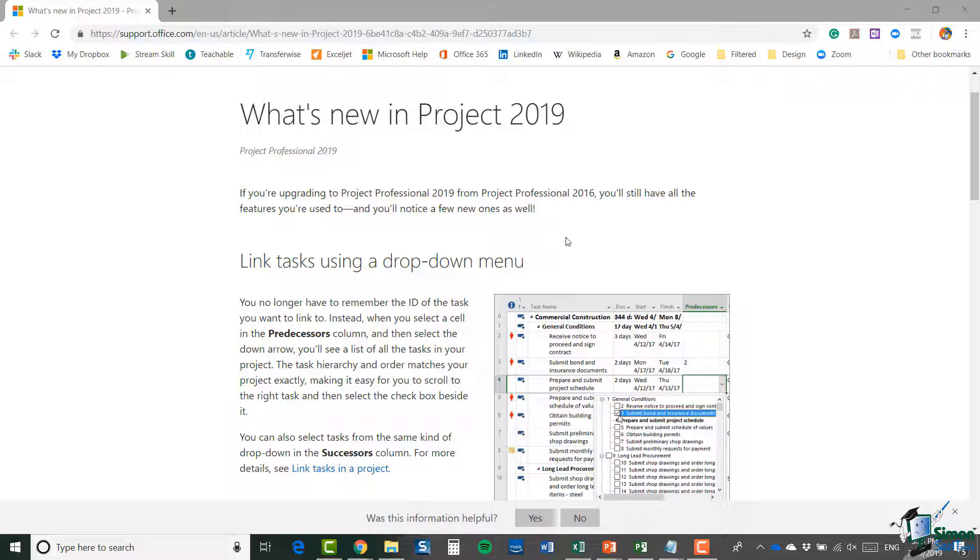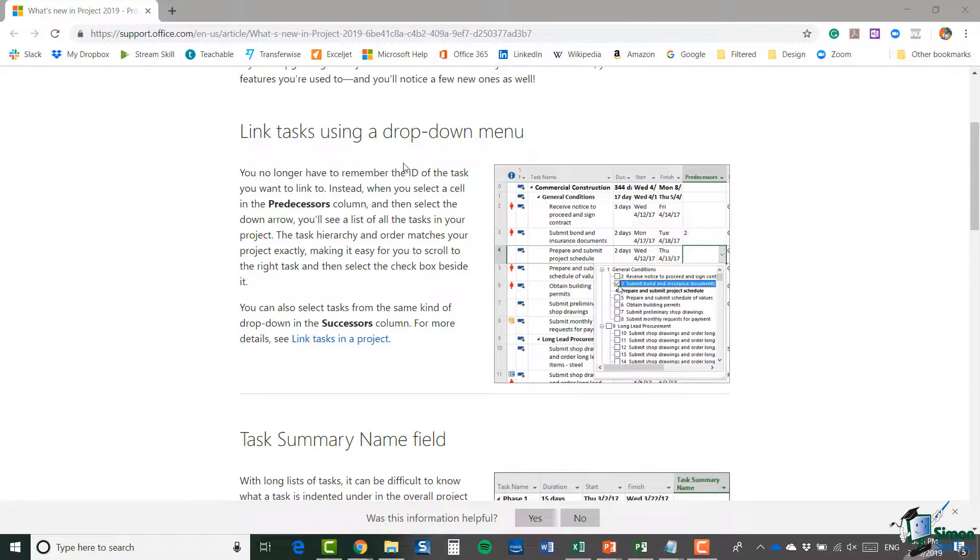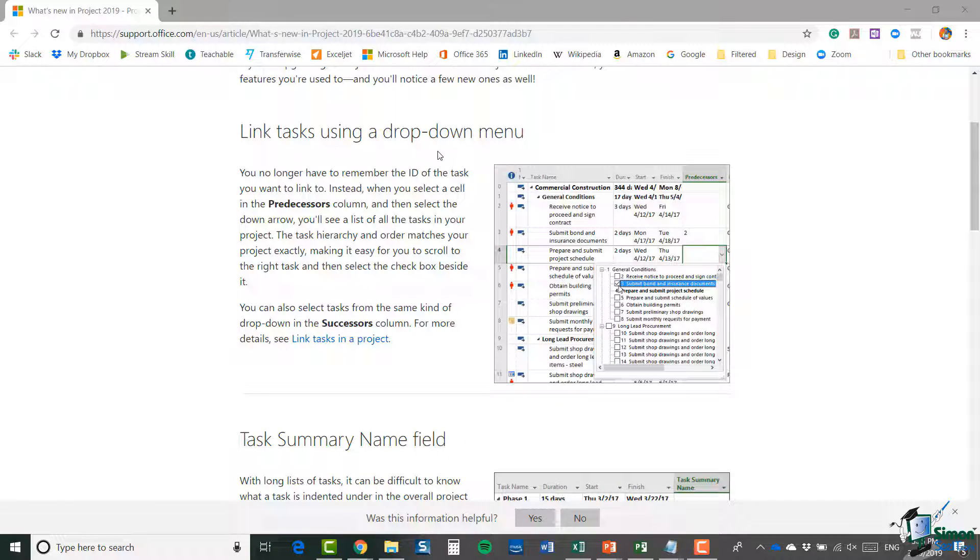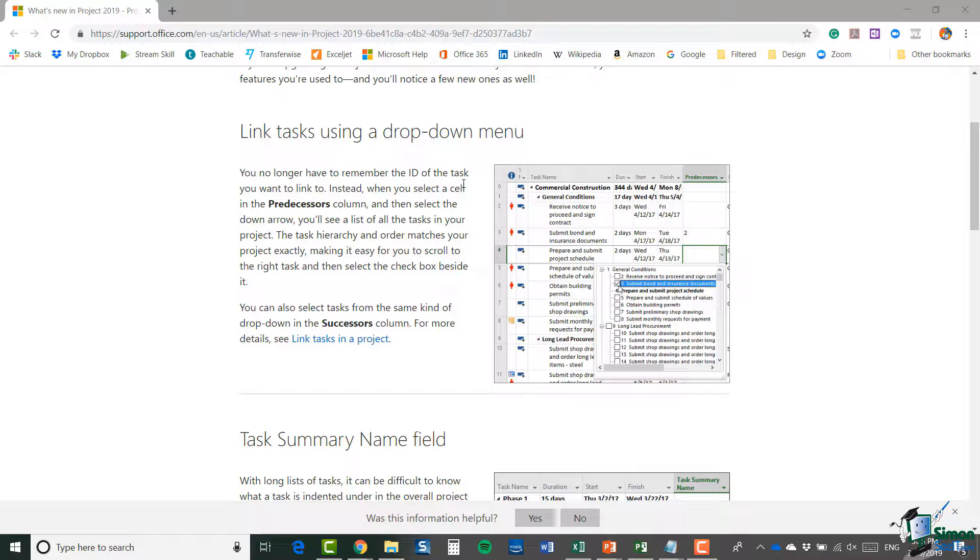drop-down menu. Instead of having to remember the ID of a task when you're linking tasks together, you can just click in the predecessors column and from the drop-down arrow you'll get a list of